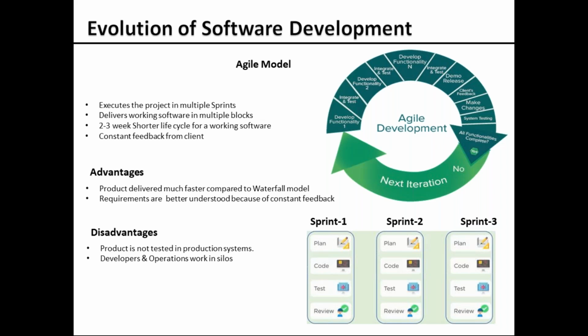Based on the priority of the client, in these 10 requirements, let's say we're going to pick only 3 for the time being, which have a clear understanding of the requirements. The rest are on the client requirement board, but they are not very clear; the client is still brainstorming on that. So we don't need to wait until they come up with all the finalized requirements. For the requirements that are finalized, the teams get started on the development of the functionality.